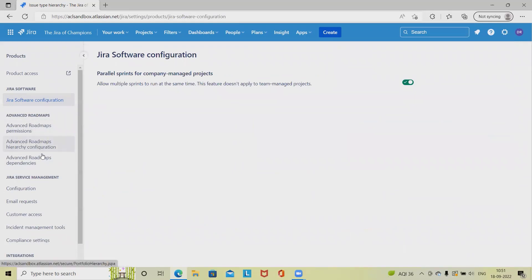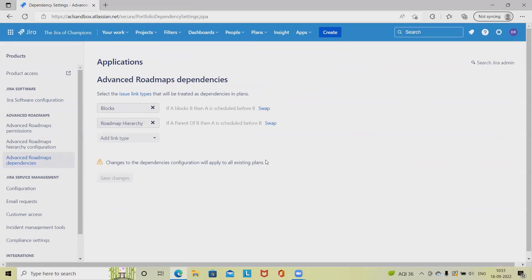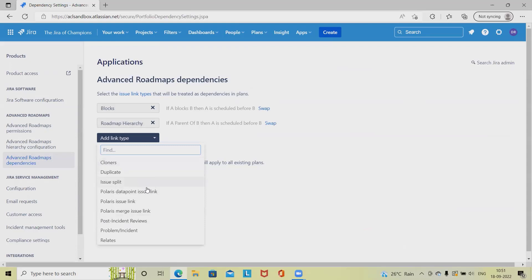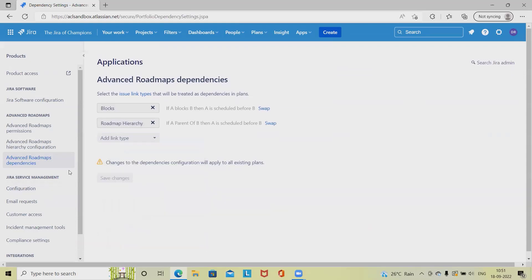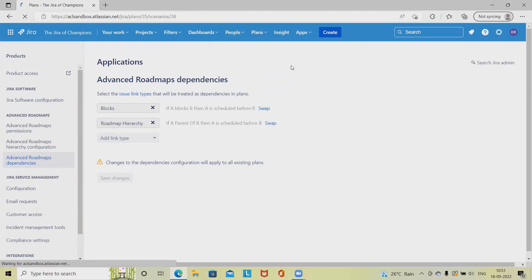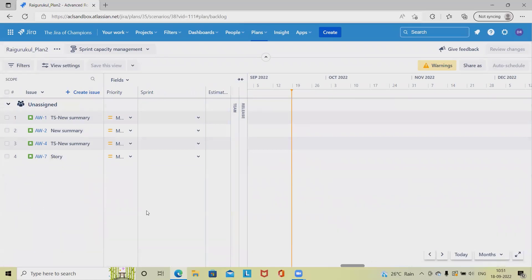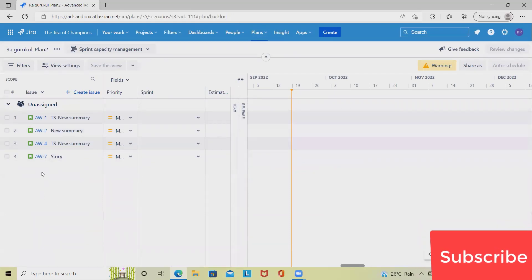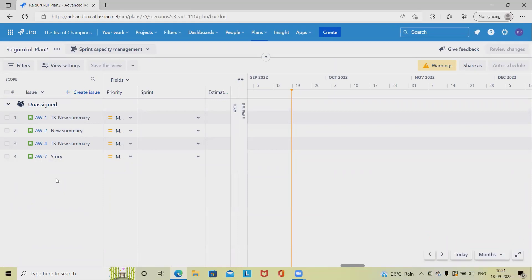Another section in advanced roadmap customization is advanced roadmap dependencies. When customizing dependencies, we have different sections like selecting issue link types that will be treated as a dependency in the plan. We can add any number of link types such as duplicates, clone, and issue split. We can make changes and save them, and they will be applicable to our advanced roadmap sections.